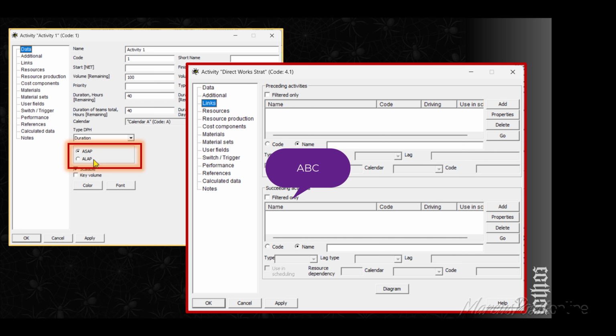When you do as soon as possible, probably you find the problems sooner. But when you already know the path, it's easier when you put as late as possible because of the pressure to do. Okay, you don't want to have pressure on your work, but you may take all the risks you have when you start as late as possible.